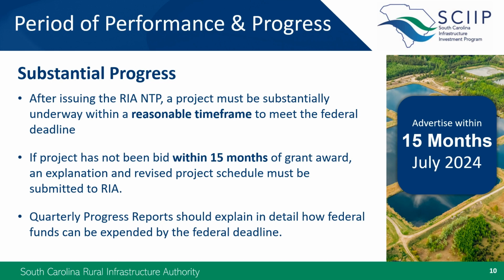We will expect that you stick to the schedule presented to us. Ultimately, it means careful, detailed project management, unlike some of the flexibility we have had in the past. Similarly, if there is an unexpected delay, it is the grantee's responsibility to notify RIA immediately and to provide a revised but detailed project schedule.